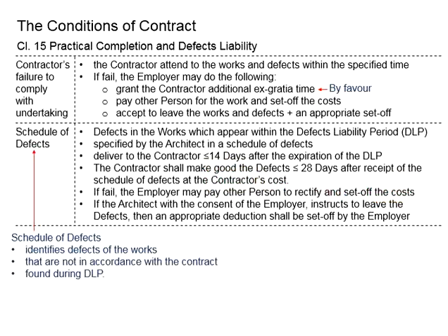There is another option. If the contractor does not rectify the defect, the architect may instruct the contractor to leave the defect as it is, and this will require the consent of the employer. That means the employer will need to agree that the relevant defects are left without being made good. However, there will be deductions in the payments by the employer to the contractor.